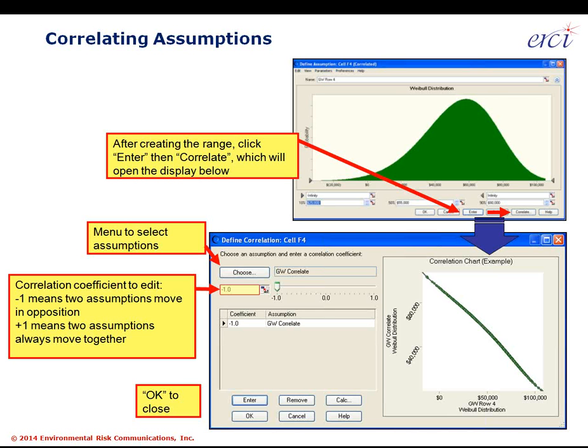The next is to identify whether there's a positive correlation, meaning the costs will move up and down together, or a negative correlation, where spending more in one will directly be offset by spending less in another. The next activity before fixing on a rate is to figure out whether it's a perfect 1.0 correlation, a modestly strong one like 0.8, a modestly weak one like 0.5, or a fairly neutral one like 0.2. Putting something in there, testing it, going back to this window, changing the number and trying again.